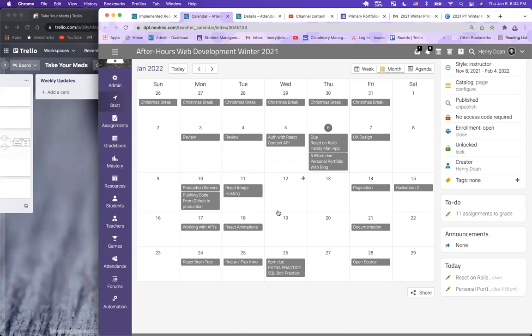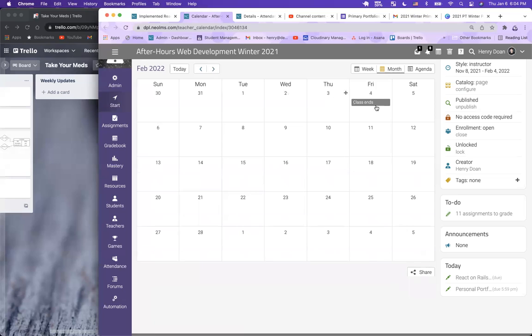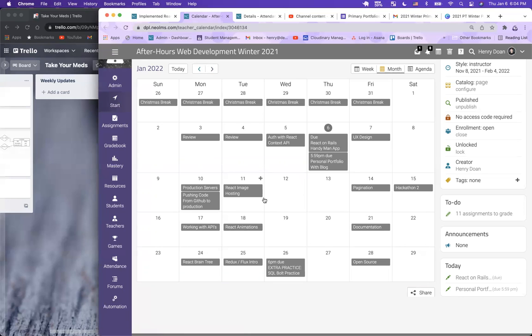That means that technically you have inside of class around 6 days to work on it. And 6 days is not nearly enough to finish a whole entire project. So that's why you have to allocate time outside of class, like either on the weekends, on the weekdays, and before and after class to meet the deadline for Friday the 4th. And then on this week, again, we're just cleaning stuff up and finishing everything. So that is timeline wise of what we are going to be doing.